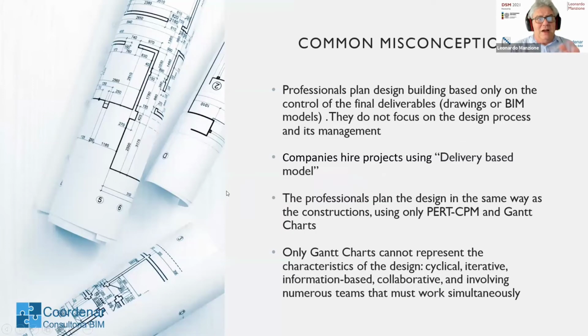Okay, so let's go to the conclusions. The common misconception: professionals plan design building based only on the control of the final deliverables, drawings or BIM models. They do not focus on the design process and its management. Companies hire projects using a delivery-based model. The professionals plan the design the same way as construction, using only CPM and Gantt charts. That is the reality. Gantt charts alone cannot represent the characteristics of design, which are cyclical, iterative, information-based, collaborative, and involving numerous teams that must work simultaneously and collaboratively.